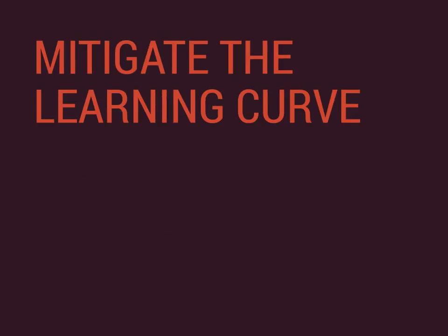So in terms of the mitigation of learning curve, there are three things that I have seen used effectively. One, at Phase Two, we called it a technical review board. That's pretty scary sounding. It made sense for a company of 150 or 200 or whatever they're at now. But you plan a document, and then all of the senior level architects across the entire company come in and help to critique. If you've ever heard of a design crit, you put the technical plan up, and you have people from other projects come in and critique that plan.